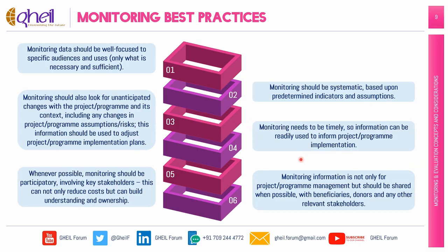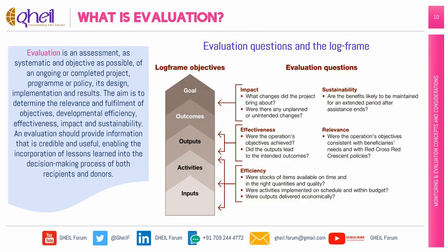Monitoring needs to be timely, so information can be readily used to inform project program implementation. Whenever possible, monitoring should be participatory, involving key stakeholders. This can not only reduce costs but can build understanding and ownership. Monitoring information is not only for project program management but should be shared when possible with beneficiaries, donors, and any other relevant stakeholders.